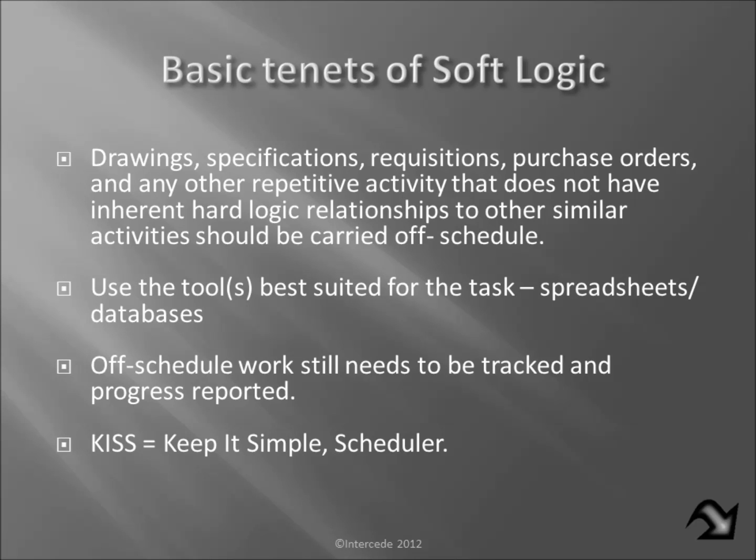These are the basic tenets of soft logic. Drawing specifications, requisitions, purchase orders, and any other repetitive activity that does not have an inherent hard logic relationship to other activities should be carried off schedule. And what this means is that drawings do not have to be executed in any kind of specific order. In fact, experience seems to show that many drawings will be started, but not necessarily finished in the same order in which they were started. And so it's only important to track the progress being made on the drawing, not necessarily the order in which that drawing is being worked.